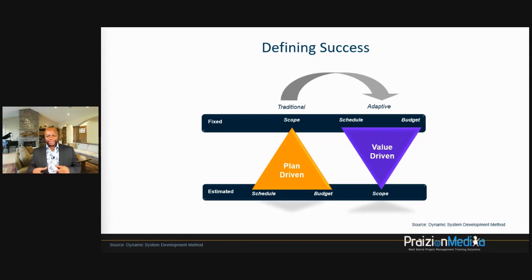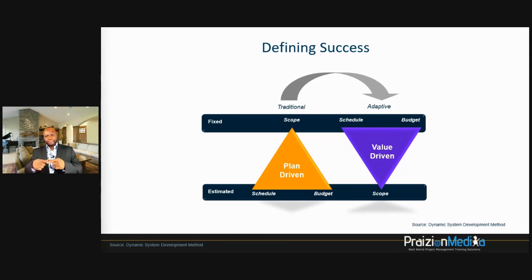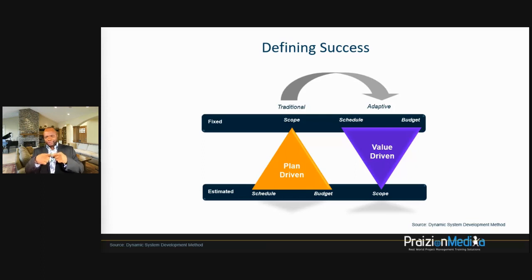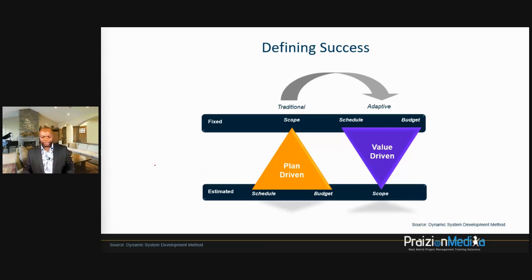What does that mean? What I just showed you was an example of a time box. If you fix the time box, the question becomes: what scope can I fit in? The time box is rigid, but the scope you fit in is flexible.